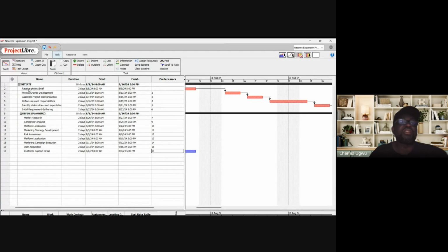So this is the first task under the stage. What we are planning is tasks, not stages. That's why we indented it, to show that this is a stage. This is a big category. This is a big work. And what we are planning is activities under the stages, not the stages itself.